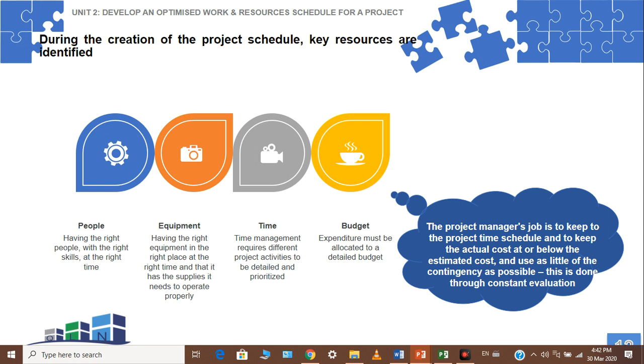Okay, so with time, when you're looking at a project, we might be able to allocate a certain process to a number of people, and if it is effort driven, I could have one process that I put four people on, and it might take a quarter of the time that it initially did, because I had four people at 100% involvement, or dedication to it.